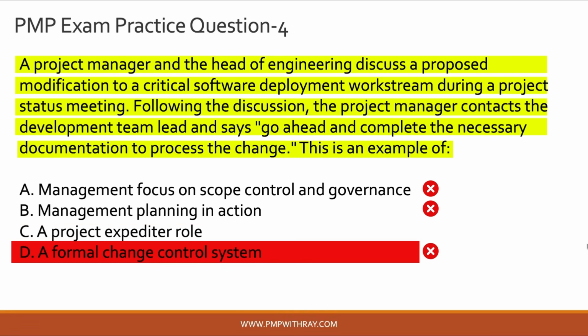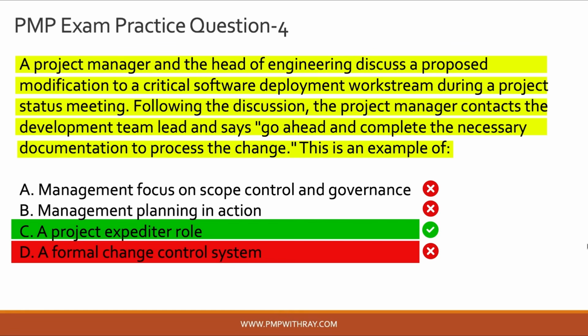So the correct answer to this question, you'll be surprised, is option C, okay? And that is a really important PMI concept which you need to know for your PMP exam. A project expediter is a role, okay? It's not a job title. Now, fair enough, many candidates think of it as a separate person, that there is someone standing in your project management office who has the title of project expediter, but that's not quite right, okay? In smaller organizations, a PM can themselves act in the expediter role, just as a PM can sometimes act in the project coordinator role as well, okay?